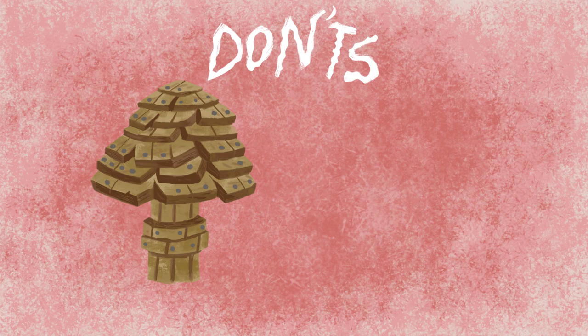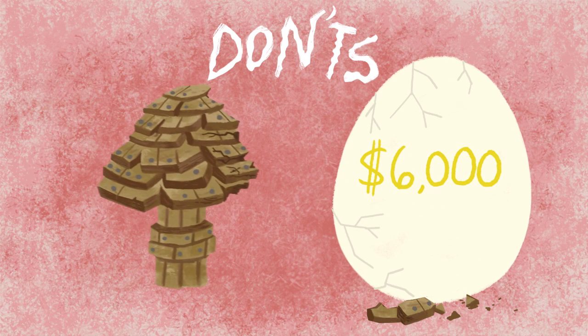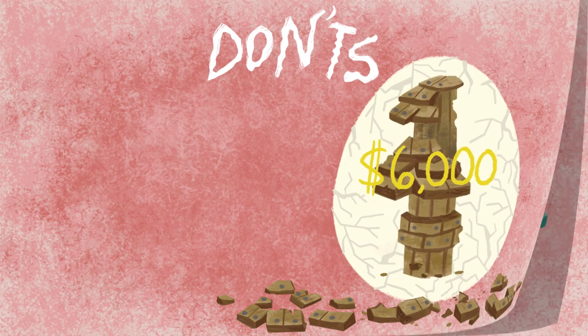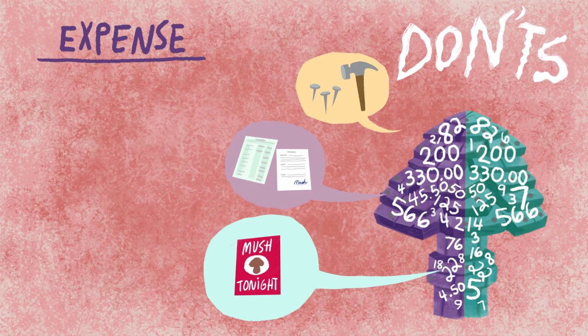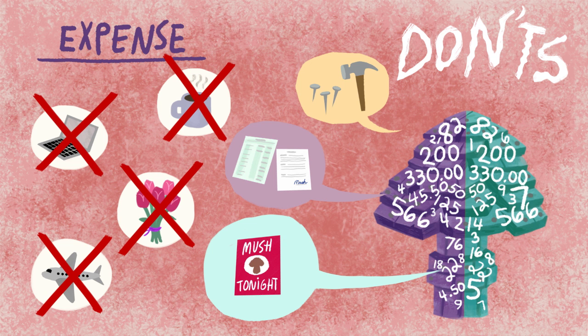Do not start the budgeting process with a request amount. Attempting to reverse engineer a project to fit a specific budget amount will result in a weak proposal. Don't list any expense in your budget that has not been addressed in the narrative of your proposal.